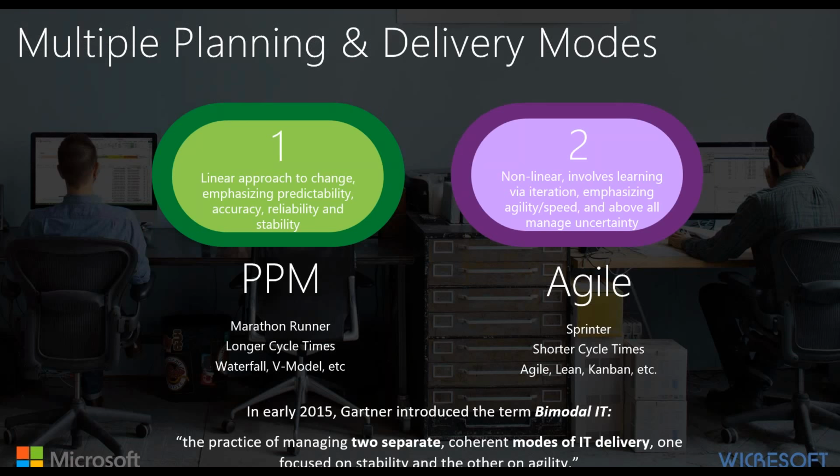Mode 1 being a more linear approach and more traditional, more of a PPM governance-driven type of approach, has the analogy of a marathon runner, kind of steady as she goes, projects with longer cycle times and phases using more waterfall types of approaches. Where mode 2 is really a more non-linear approach, more iterative, emphasizing agility and speed and being able to respond to change and manage uncertainty. The analogy there is more of a sprinter, things with shorter cycle times and more iterative-based development and delivery, using things like Agile, Scrum, Lean, Kanban types of approaches.